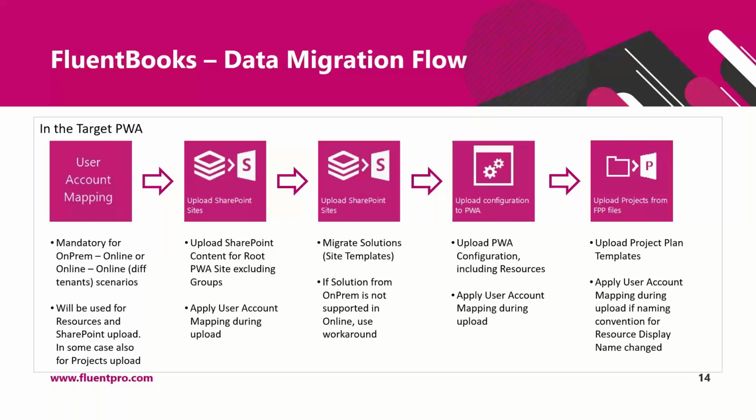If project plan templates are uploaded into the PWA before the resources are uploaded, then all the resources that are stored in the project plan template will become local. And after resources are uploaded into the PWA, project plan templates will become broken and projects will not be created from them. So the sequence of the steps should be preserved here. Resources should be uploaded into PWA first, and only then project plan templates can be uploaded.